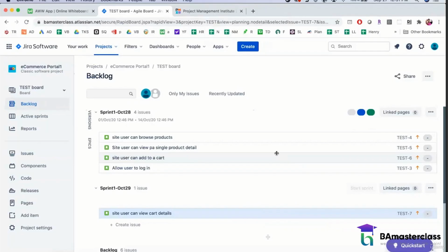The only reason it would not be done is because it's an epic, a large thing. I'll tell you, I've been in sprint planning meetings where I walk the developers through a user story. Once the developer reviews it, they tell me, you know what, it looks simple, but there's a lot of technical implementation in this, and I don't think we'll be able to do this in one sprint. So they tell me, let's divide this into 3 stories.